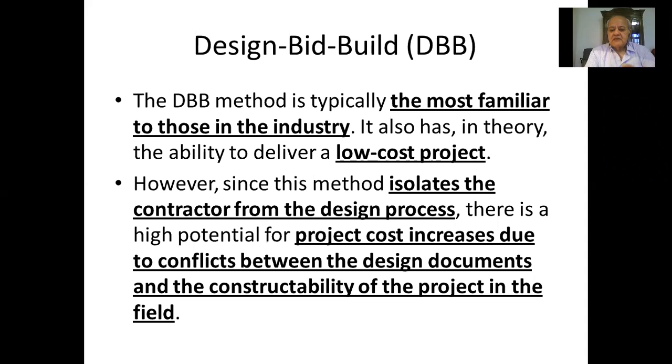Also, another problem is that it isolates the contractor from the design process, because you start the design without knowing who the contractor is. Sometimes when the contractor is involved from the beginning of the project, it makes the design even better, because it is based on their capabilities and equipment and previous experiences and so forth.